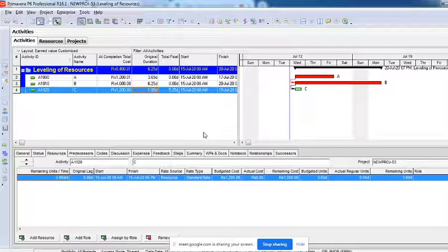You understanding? Resource analysis is very important, very important. You will have to understand there can be 2 possibilities. Either the resource can be over allocated, or a resource can also be under allocated. Under allocation of the resource is also not good. That means you have 10 people but you can give only the work for 5. What will the other 5 do?